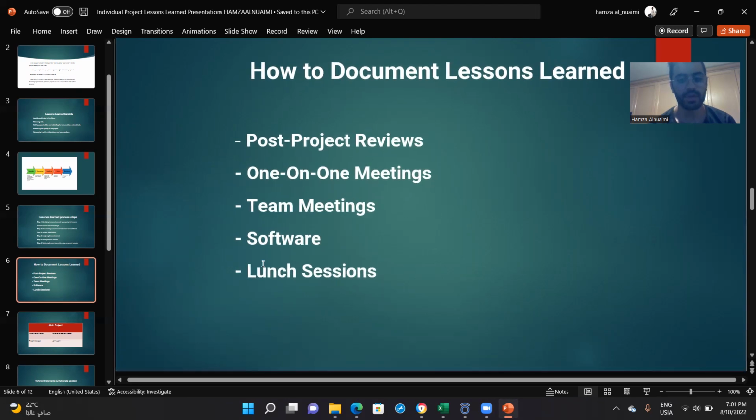Team meetings: you shouldn't wait until the end of the project to conduct the project lessons learned. Make it a regular experience to share and record lessons learned. Inquire about what team members have learned this week and discuss it in an open environment.